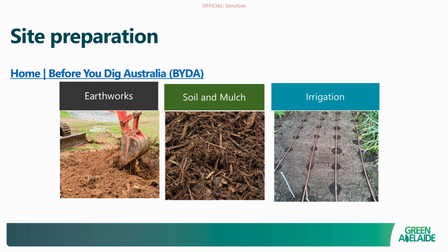So there are a few different examples here for things that you need to consider. So earthworks to begin with. Irrespective of size, any work that you do has the potential to damage assets which are located under the ground. So what used to be known as Dial Before You Dig is now called Before You Dig Australia.